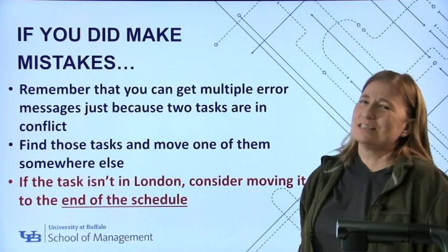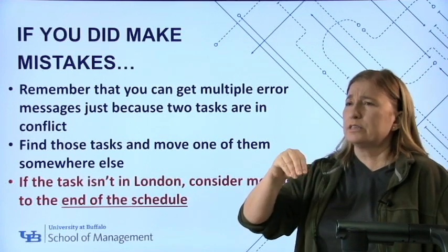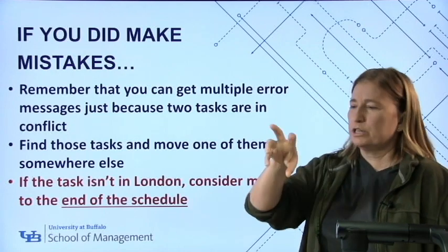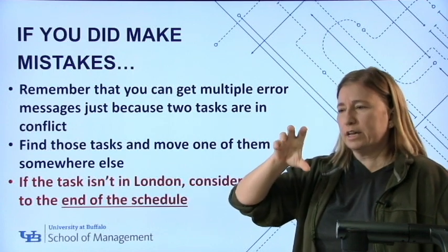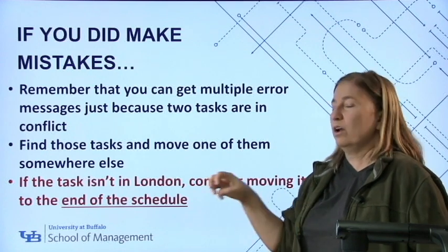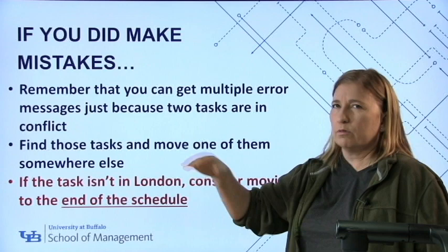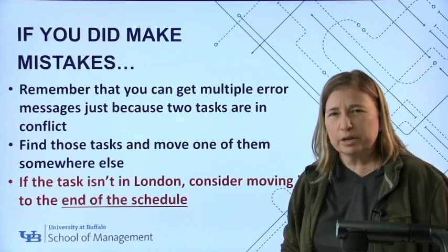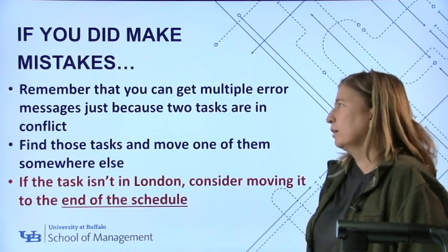You can't necessarily do that if the filming task is in London, and the reason is that you film and then you tear down the set. So if you were to take a filming task and move it to the end of the schedule, you would have to take the task striking the set and also move it even farther out and back, and then you might run into trouble with having more than 3 sound stages. And anyway, it's a little bit more complicated. You have to be a little bit more careful. But if it's not in London, super easy. Just tack it onto the back.